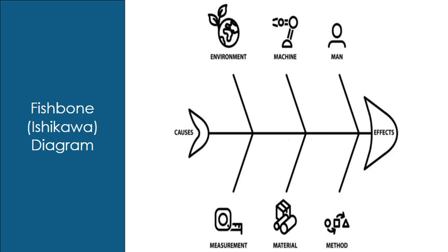When the 5 Why system will not be effective, there are other systems that may produce better results. Use these methods instead. Fishbone diagrams, also called an Ishikawa or cause and effect diagram, is a visual tool used to find the root causes of a problem. It looks like a fish skeleton, the head being the location of the problem, and the bones branch out to show different groups of causes. Use it when problems have multiple contributing factors that all need attention.